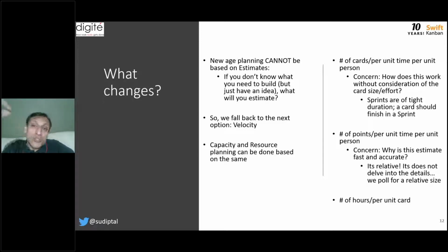Earlier, about 7-8 years back, we used to take a planning poker based approach to do that sizing, which still fundamentally relied on a sizing model, though it was a lot more approximate and gut feel based. And increasingly, agile teams have now moved to relative sizing because it's faster, it's quicker, and it serves the purpose that you need to get a sense that, hey, a card of this size earlier has taken me X number of sprints given a team of this size.